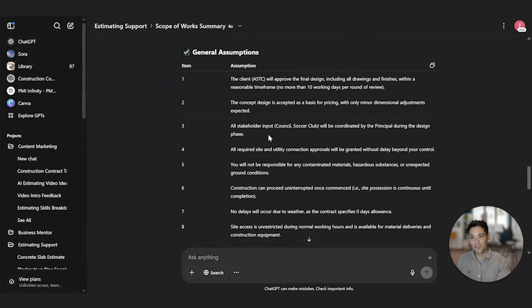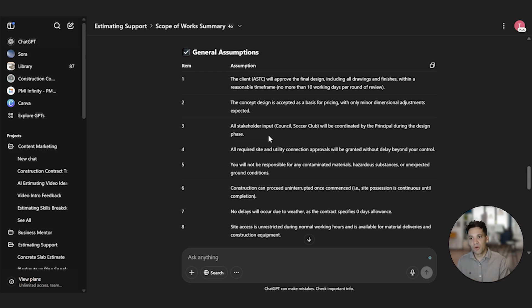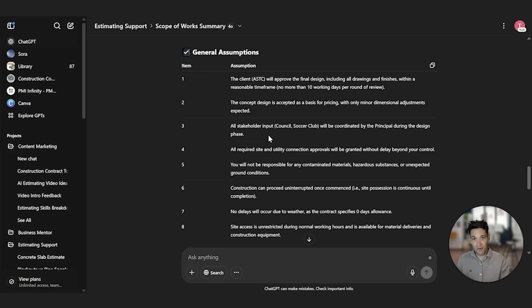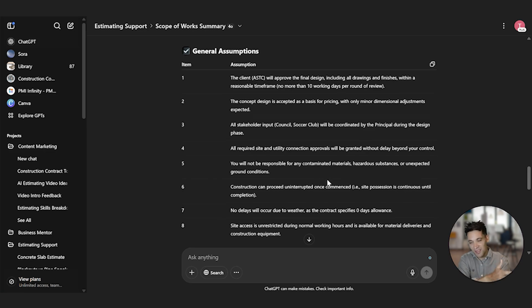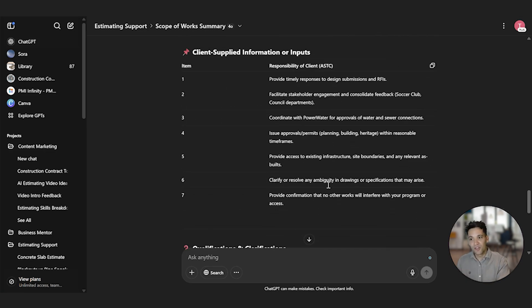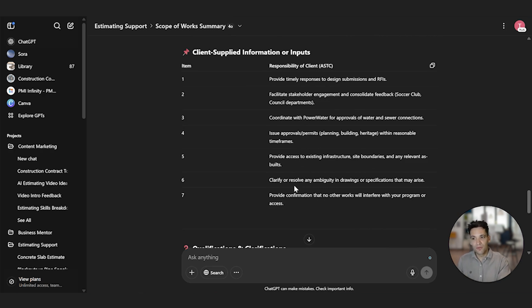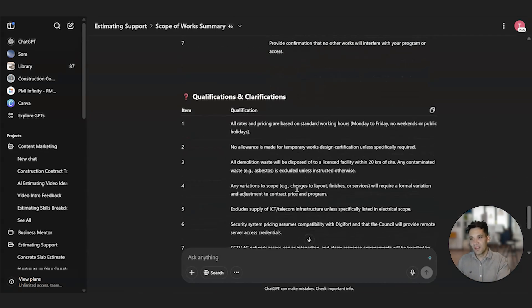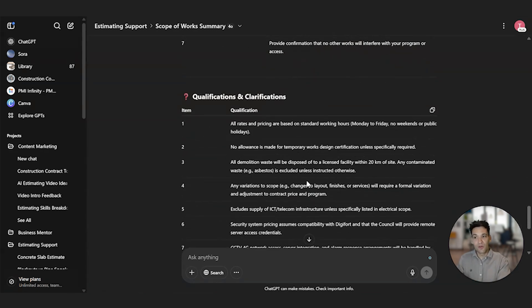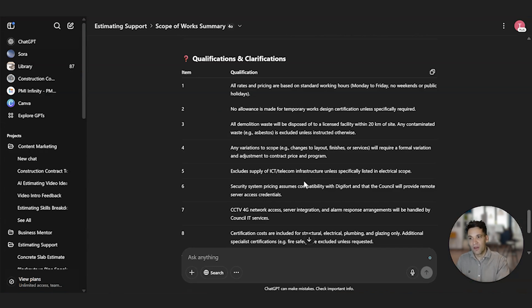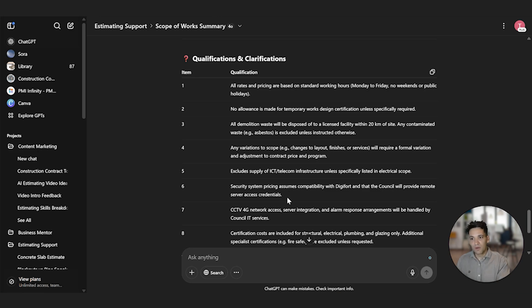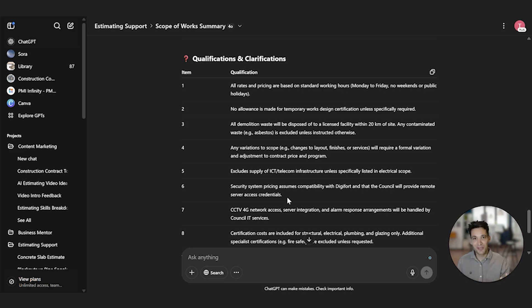So now it's broken it down into a list of assumptions we should document. So general assumptions and client supplied information or outputs, and then qualifications and clarifications that we might have to ask. So for an example, as an assumption, it's assuming all stakeholder input will be coordinated by the principal during the design phase. All required site and utility connection approvals will be granted without delays beyond our control. Now that's a great example of something you would actually want to include in a letter of offer for this project because it's something that can impact your cost and delivery during construction. It's assuming client supplied information, any permits and approvals will be issued within a reasonable time frame, will clarify or resolve any ambiguities quickly in the drawings or specifications. And then we've also got qualifications and clarifications. No allowance for temporary works. All demolition will be disposed of to a licensed facility. Security system pricing assumes compatibility with Digifort. I mean, I haven't read the documents, but it looks like great information to actually include in your tender submission.